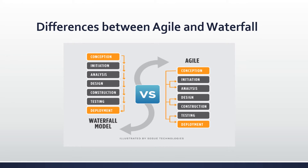Requirements are reviewed every day in agile, while in waterfall they are prepared once at the start. Agile allows requirement changes at any time; waterfall avoids scope changes once the project starts. Testing is performed concurrently with development in agile; the testing phase comes only after the build phase in waterfall. Test teams in agile can take part in requirements changes, while in waterfall test teams do not get involved in requirement changes. Agile enables the entire team to manage the project without a dedicated project manager, while waterfall requires a project manager who plays an essential role in every phase.